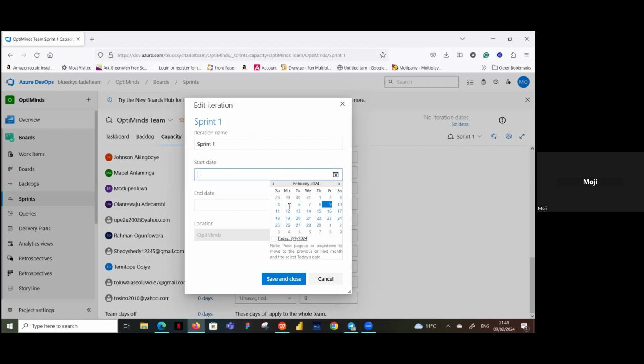Am I right, Abimbola? It started on Tuesday, not Monday. So you did your sprint planning on Tuesday. Yes, on Tuesday. Okay, so the date for your sprint is fixed. It doesn't change, even if you didn't do your sprint plan when you're supposed to do it. So that's your team losing one day. Yes, okay. You can't change it.